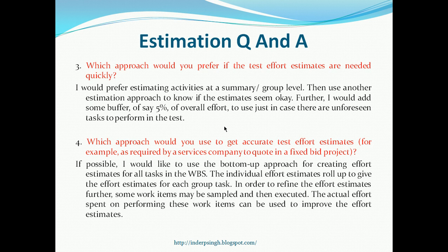So here you can use the bottom-up approach for creating the effort estimates. So you can create a very detailed WBS and look at each and every low-level task in it and come up with the effort estimate. So all these individual effort estimates will add up and give you the overall effort estimate.